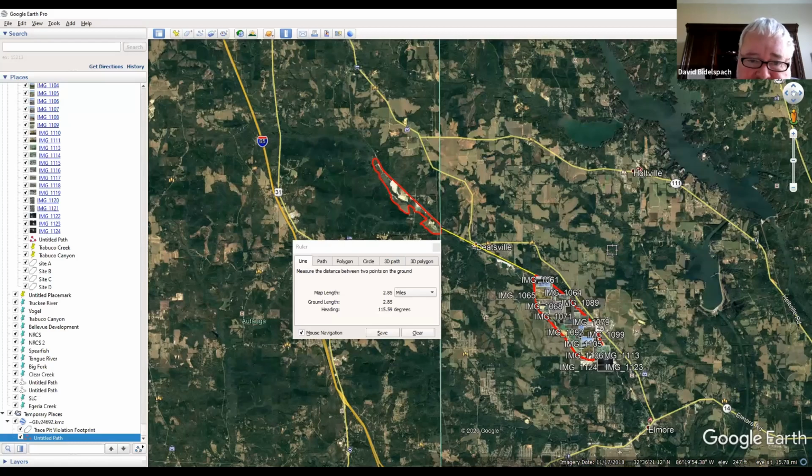But I said to Chris Terrell, this is the time for you to really look at the wetlands in Zone 2 and whether the outline that I proposed works. And so Dave Coffrin looked at it and said, based on the material that we're taking out of those embankments, we probably have enough material to fill that one pond that has vegetation growing out on a couple of peninsulas into the middle of it. So I said, then let's do that. And then we'll wind up with even more wetland, and that should make EPA even happier, you know? And he said, well, we only have to give them exactly what we have to give them.